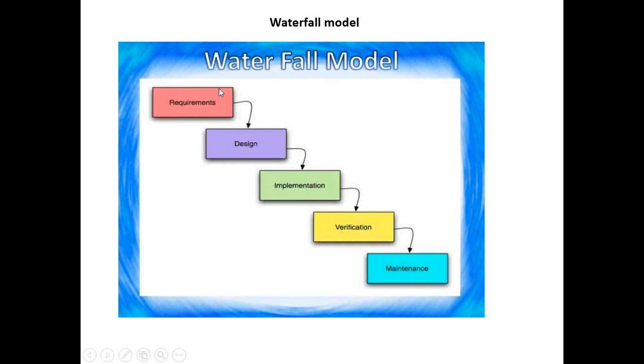Now the reason it is called waterfall: just like a waterfall cascades from a cliff to ground, the same way this model works. You start off with requirements. Only when you complete your requirements, you start design. Only when you complete design, you start implementation, and only when you complete implementation, you'll start testing.